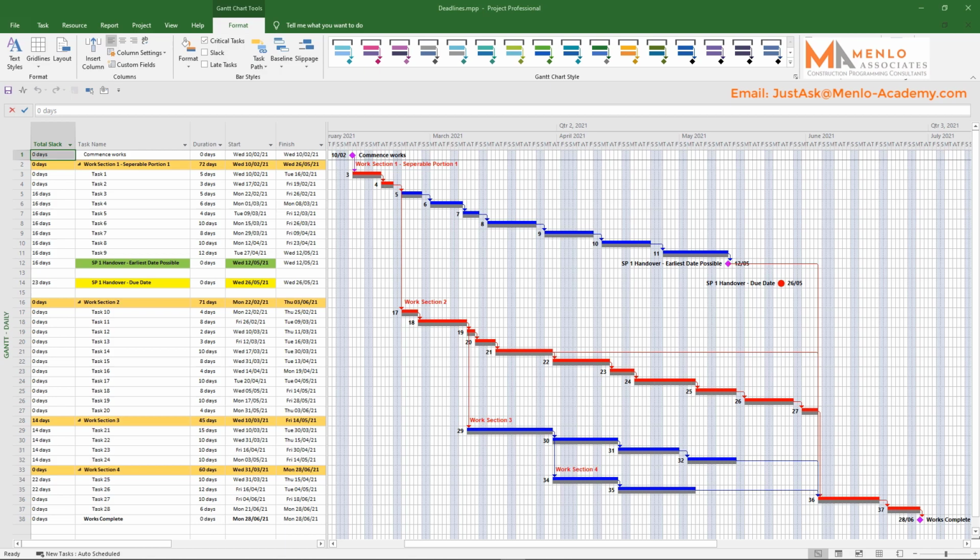We can also use deadlines for different purposes. Because they tell us when something needs to be done by, your first thought may be the project completion milestone. You could indeed use it for this, and doing so would give us a means of comparing our forecasted completion date to the planned finish date as the project evolves.